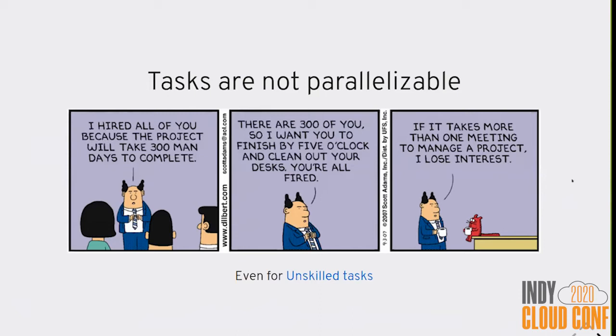The people who are packing the van need to also be the people unpacking it at the other end, so they know which boxes are fragile and which ones are stacked on top of what. Even in a very basic unskilled task, the tasks are not completely parallelizable.